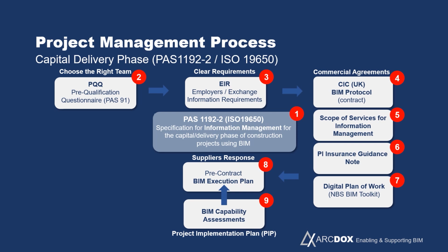It's a document. There's a lighter version at tender stage called the pre-contract BIM execution plan, which would also then include some detailed BIM capability assessments describing their IT infrastructure, their HR infrastructure.